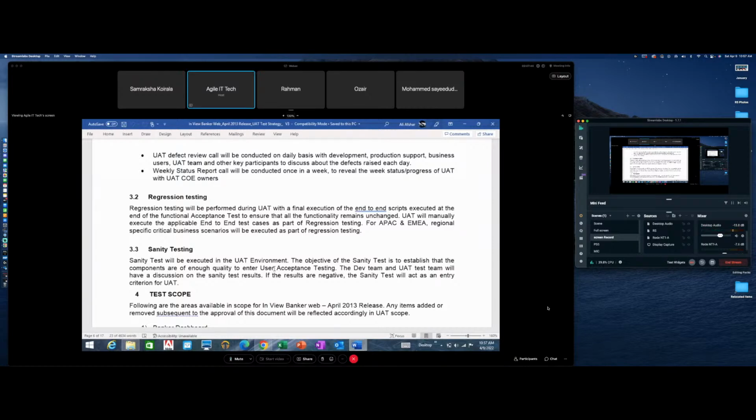So you would need a 5-member testing team. Everybody agree? Yes. Now you could also have your test lead that will test also. So you could get away with 4. But if it was my choice, I would get all 5. Okay? So that's how we determine the size of the testing team, the number of testers. Everybody clear?